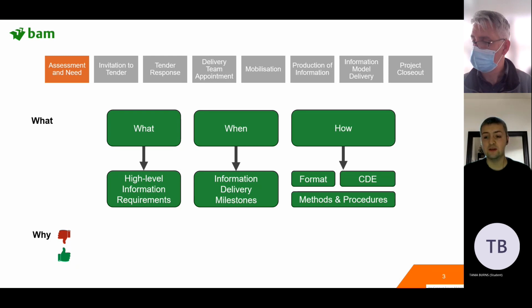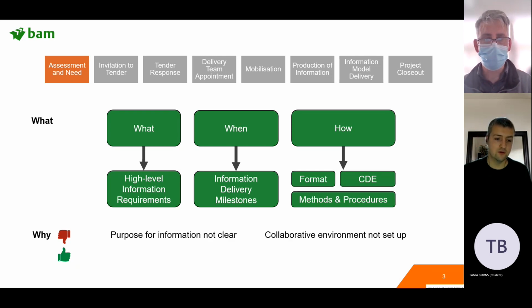It also provides everyone with easy access to the latest information. The CDE will tell you when things were uploaded and when things were revised. It lets you access previous revisions of drawings if you need to, and so on. So it's a far better way of sharing and accessing information compared to email and servers and things like that.